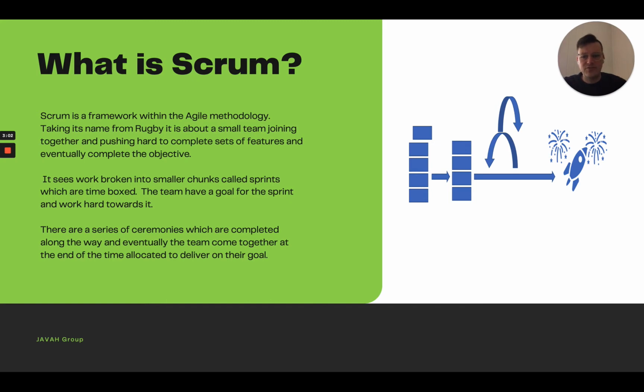There's also several ceremonies that happen around Scrum. So you have things like your kickoff meetings. Right at the start, you plan for the sprint, you bring your tickets in, you discuss what the goal's going to be, and you identify exactly what's going on. And then each day you go to work and you undertake your work, you execute upon it within your Scrum team.